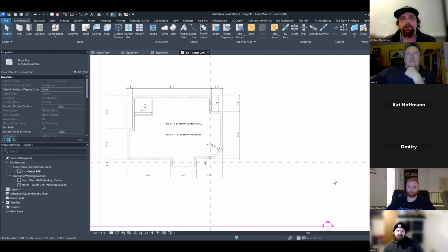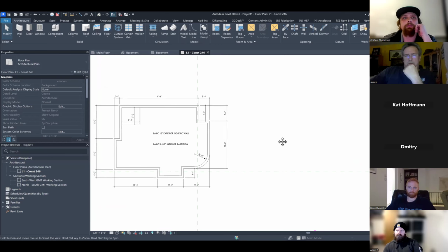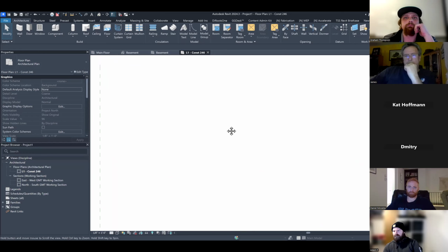I can take any set of plans and look at it, and within 30 seconds, I should know pretty much 95% of what's going on. I look at plans for a living, not just electrical. I look at architecture, I look at mechanical, all types of stuff. So I'm used to starting in the top left. I typically will read my general notes, read any notes on it, and then start at the top left and start scouring the drawing going clockwise. So we're going to use the same type of method here to draw this structure.